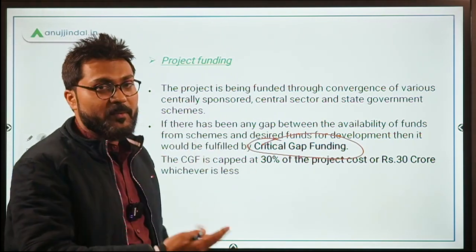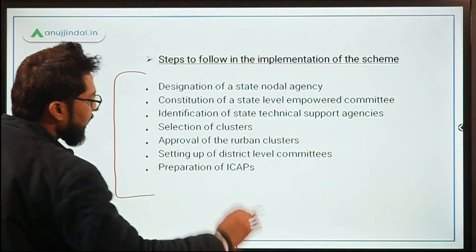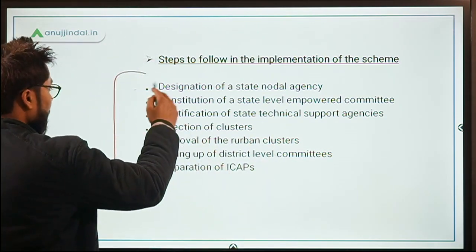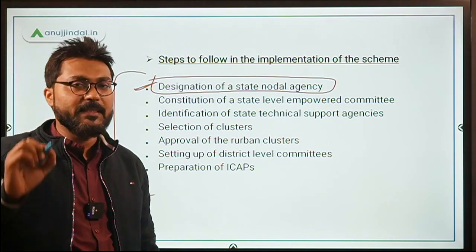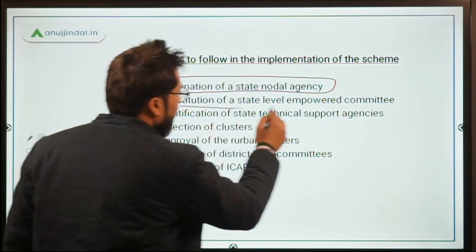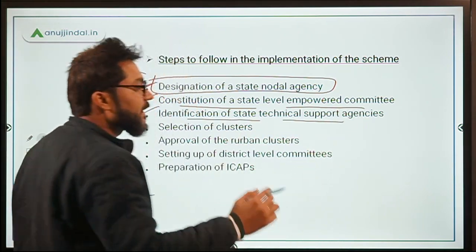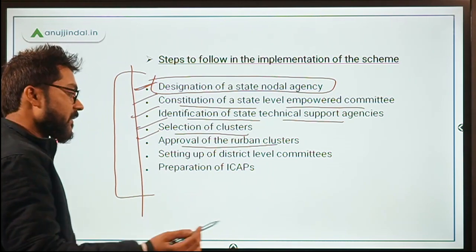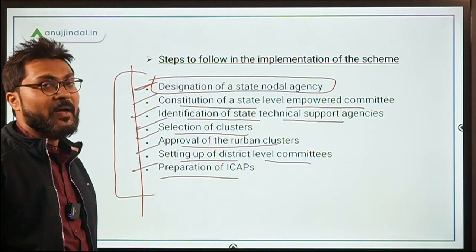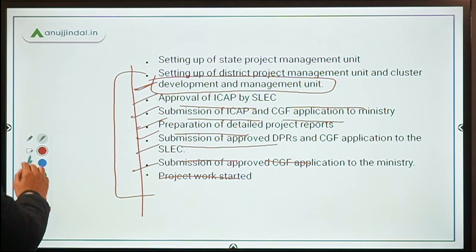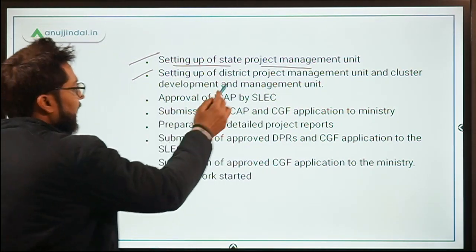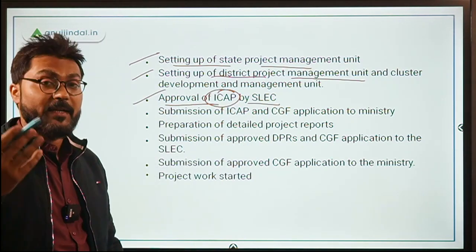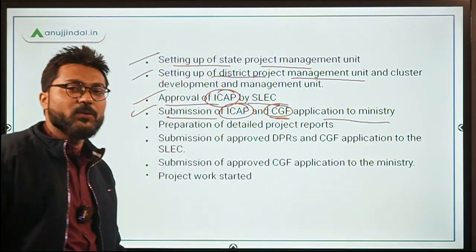The steps followed in implementing the scheme are: designation of a state nodal agency, constitution of a state level empowered committee, identification of state technical support agencies, selection of clusters, approval of rurban clusters, setting up of district level committee, preparation of ICAPs by the respective state, setting up of state project management unit, district project management unit, and cluster project management unit. Then comes approval of ICAP by the State Level Empowered Committee (SLEC), followed by submission of ICAP and critical gap funding application to the Ministry of Rural Development.